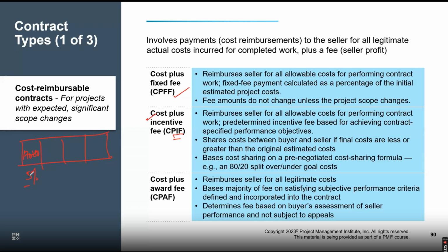If you do it within 160 and 170 days, you will get say 15%, which is great. If you do it in say 150 and 160 days, you get say 20%. You do it in 140 to 150 days, well, you get say 25%, something like that.